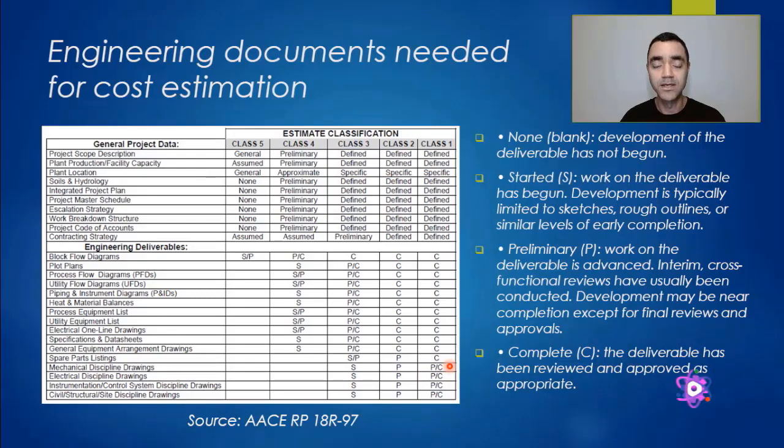front-end loading design engineering. When we go to detailed design engineering, procurement and construction, these documents must be completed so that we can erect the plant. You will not erect the plant with preliminary drawings, or you should not erect the plant with preliminary drawings. Of course, during the construction, changes may happen, and you will issue the as-built drawings at the end of the project.